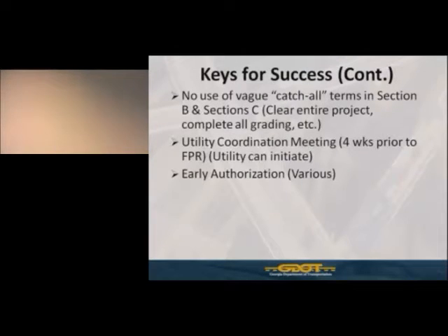We mentioned several times the vague catch-all terms in Section B and Section C, such as clear entire project, complete all grading, etc. Again, on small projects, these terms may be completely acceptable. On larger projects, they probably will need additional clarification. That's just something that would require additional discussion. But typically on the larger projects, you may need to revamp how you go about building your relocation schedules and plans and making sure you can do part of the work as a project is phased in.